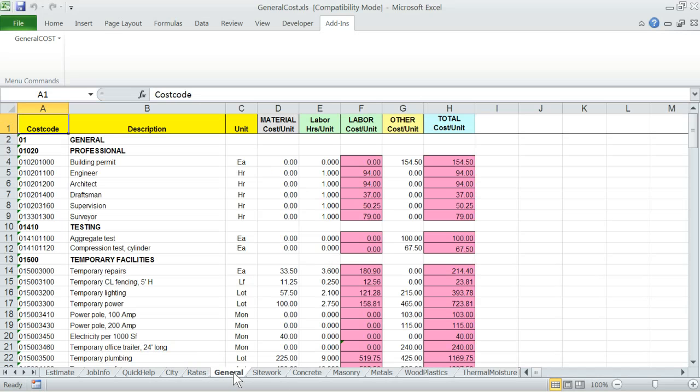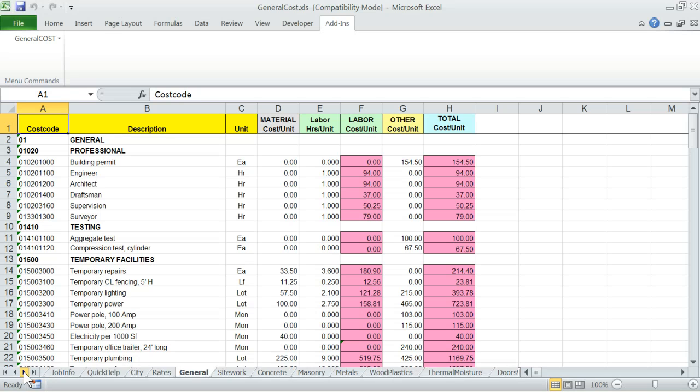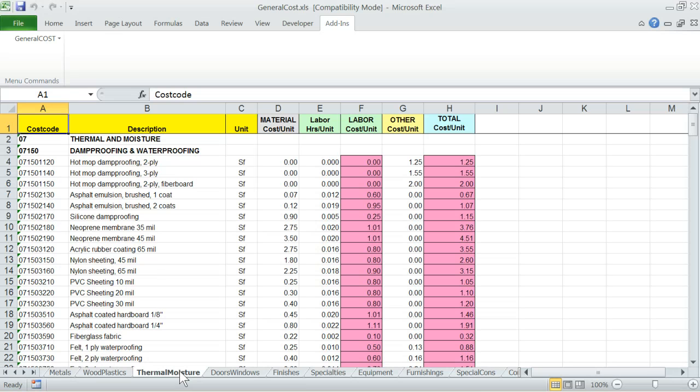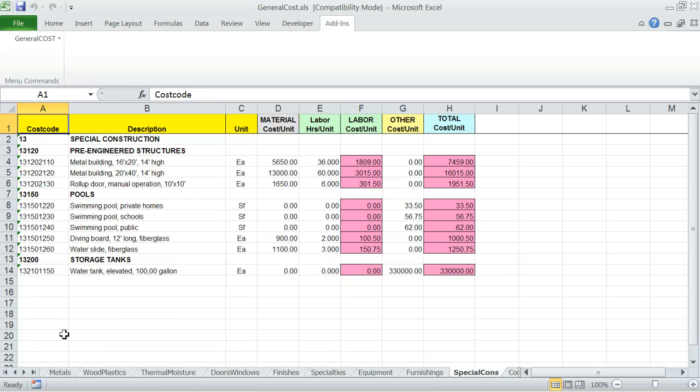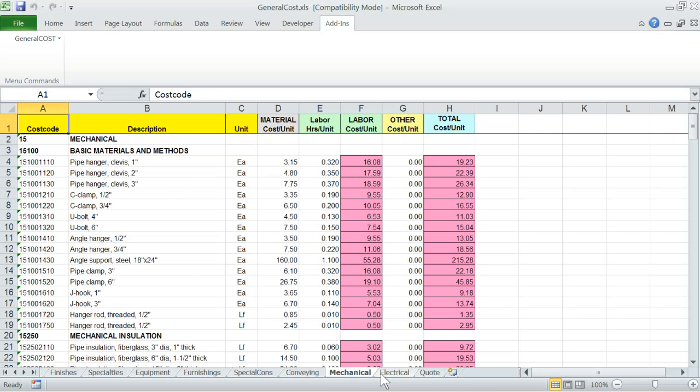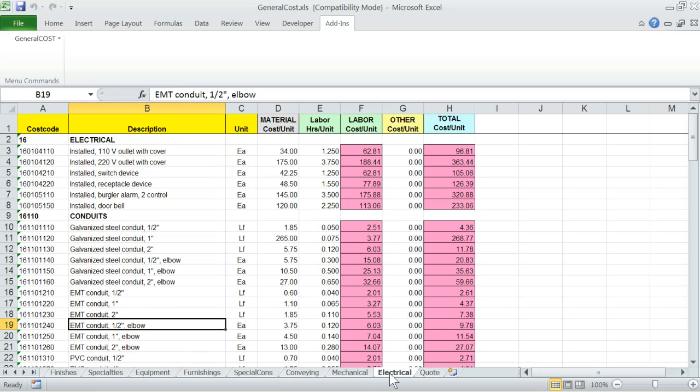General to electrical. These are the CSI based construction divisions. Each worksheet contains cost data including cost code, description, unit and cost data for material, labor and other costs such as equipment. You can add or delete rows of items from these worksheets thereby customizing the data lists. Just follow the same format as we provide, that is one row per cost data.